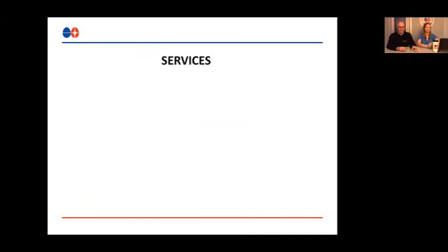So services for Jamesway machines, for our HVAC equipment, it's important and preferred. We know it's not always possible, but we do promote as preferred if permanent power, hot and cold water, and compressed air are ready for us when we arrive on site. Once again, we appreciate it. It can be a challenge to get those services coordinated. A lot of those services are being worked on while we're on site as well, doing our installation. But the main thing for us from day one is really permanent power, minimize extension cords, and have power sources that we can use, from battery charging to lighting.